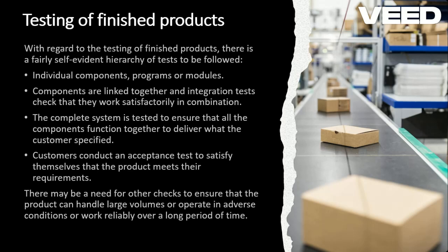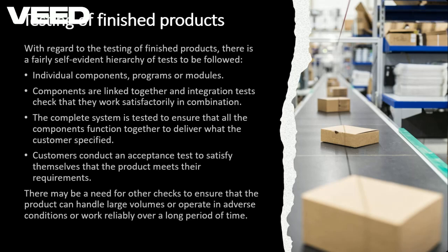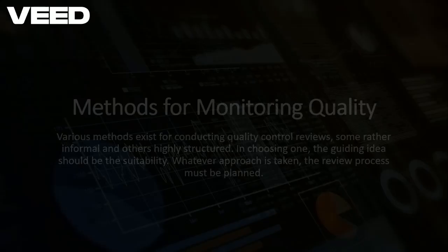So now you may have additions to the tests for finished products. For example, if you have a system that's going to be used for sensors, you may perform load testing just to check how it stands up to multiple millions of transactions in a given period. So again, the type of system or the type of project can determine which types of tests will have more prominence compared to others. All right.